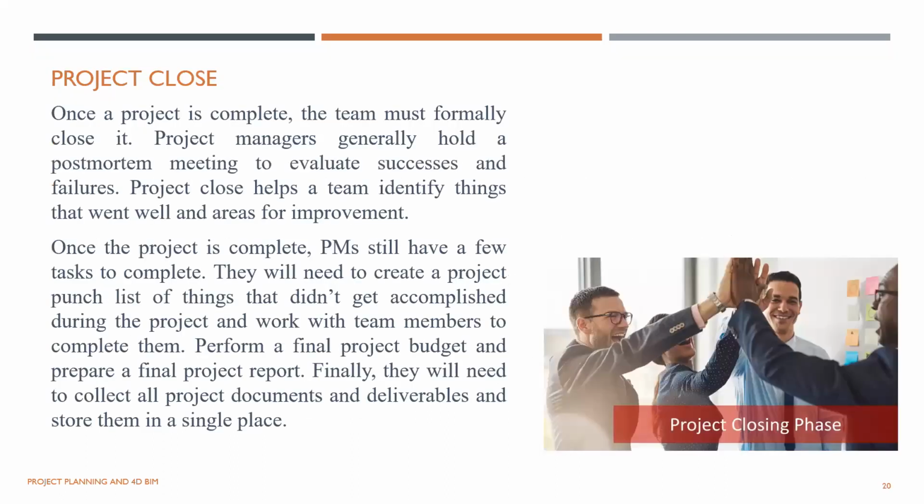Once we complete this, the final stage is the project closeout stage. In each and every project, we will face a number of problems, and that is discussed under project closeout. Especially we will conduct the project post-mortem report or post-mortem meetings. In that meeting, we will discuss what are the difficulties, the challenges, and the faults we faced, and then we will prepare a report and a checklist and hand it out to the project.